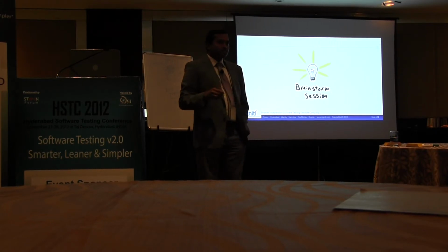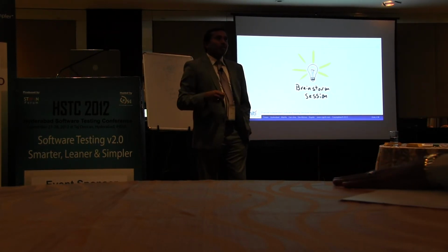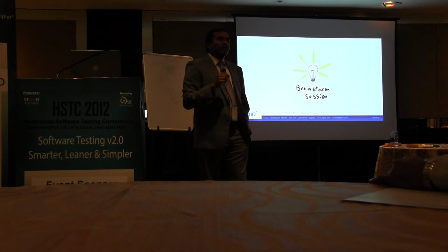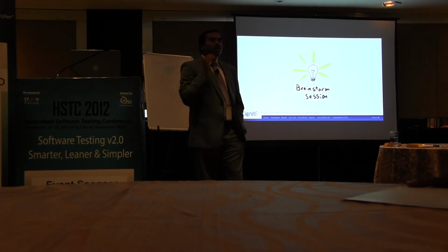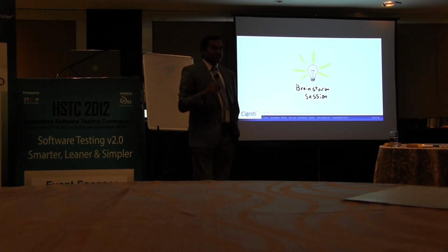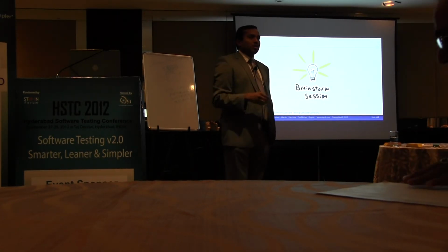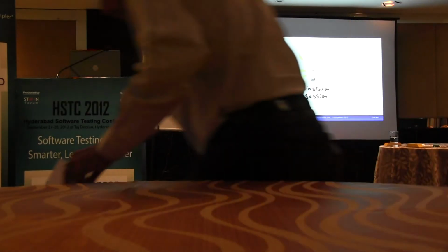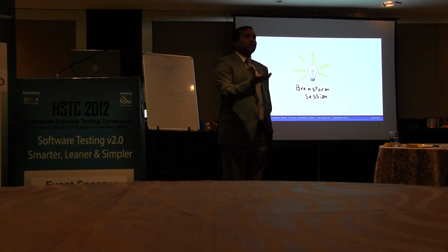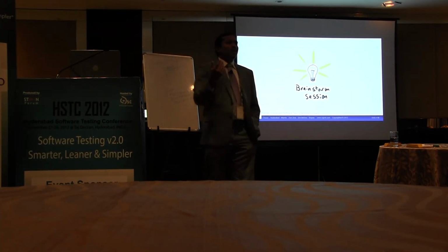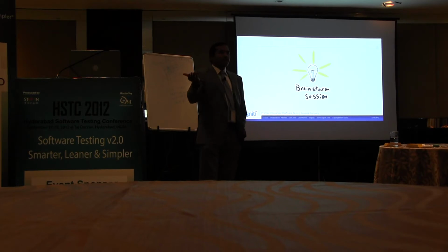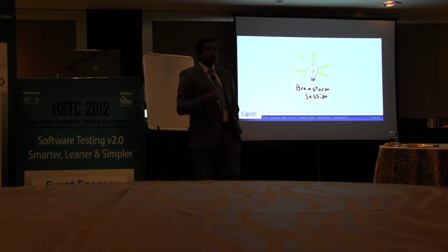But how will I know when I'm doing the modeling? When you are doing the modeling, let us say that you want to migrate 10 applications. You pick one application. Let us say that you are going to Amazon.com, you buy the infrastructure and you put it there. Amazon, or any cloud provider, gives it at a much more economical rate. Take 1 month there and then you migrate an application and start comparing it. Because if you do not test it, why do you want to do a big bang approach of migrating everything and then start looking for the results?